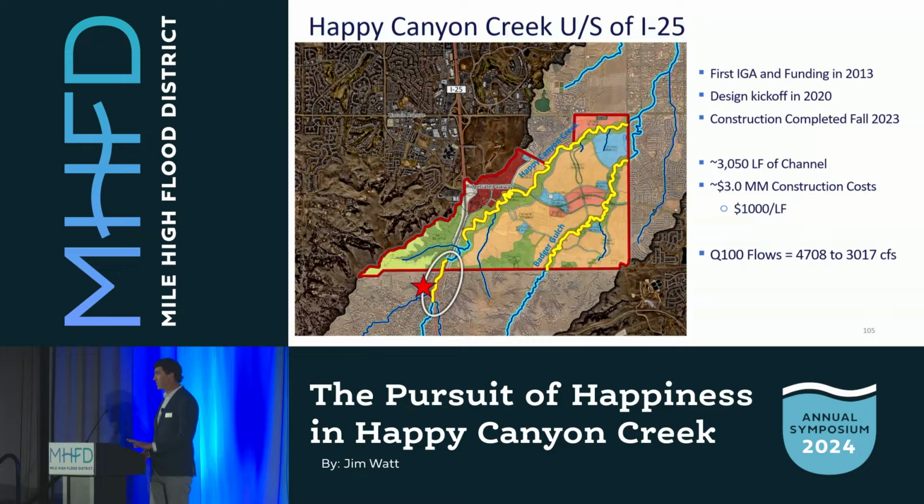This project was originally requested by Douglas County and started via an IGA with them in 2013. Due to various reasons, heavy design for the project didn't get going until 2020, and then we just finished up construction in 2023, so about 10 years in the making.